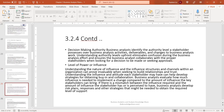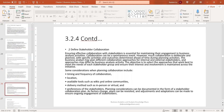Decision-making authority is another consideration — business analysts identify the authority level a stakeholder possesses over business analysis activities, deliverables, and changes to business analysis work. The level of power or influence also matters; a domain SME who knows a tool inside and out and can provide requirements may have high influence, and the sponsor may rely on that individual for sign-off. Keep revisiting the stakeholder analysis throughout the project, as stakeholders can shift over many years.